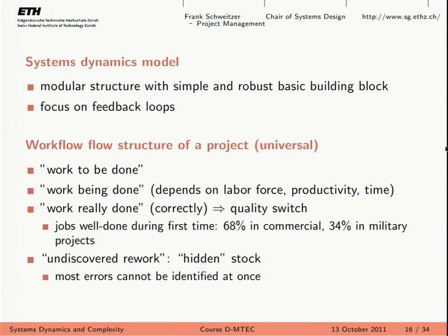They developed a system dynamics model which takes into account all these interrelationships between different tasks, especially feedback loops, right? And what happened at the end was they had this model. They could prove that these kind of small changes could result in a big overall impact. Then the shipbuilding company went to the US Navy, presented the model, and basically this was a proof that the US Navy was at fault.